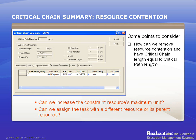At this point, you'll need to ask yourself these two questions: Can we increase the constrained resource's maximum units? Can we assign the task with a different resource or its parent resource? Assuming that you can increase the software engineer's maximum units from 1 to 2 on the Concerto resource sheet and rerun Identify Critical Chain, you might get the critical chain duration to match the critical path duration. Sometimes, however, it's not possible to increase a resource to shorten the cycle time. You might have to live with what you have. At least, the possibility of a shorter cycle time is identified by Concerto, so you know it.